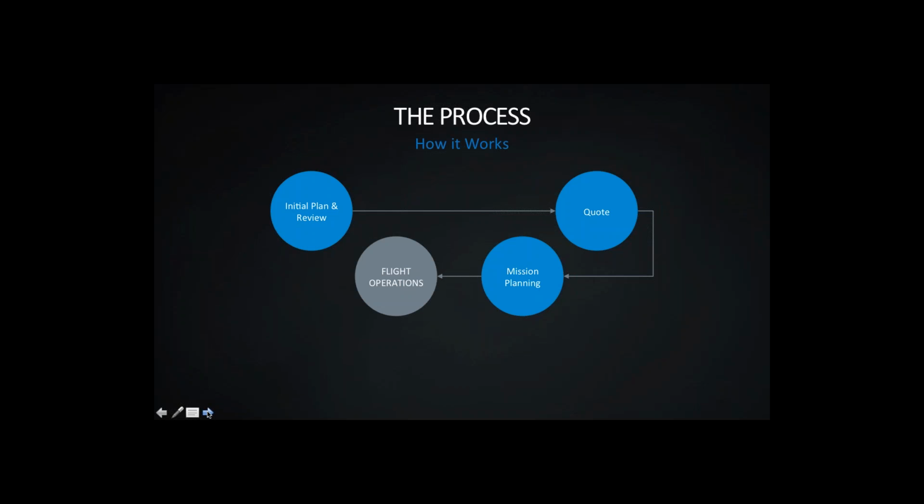The flight operations component of the process might be the quickest and shortest component of everything. Sometimes it's 2 or 4 hours on a site, which is very common for whether it's a 1-acre site or a 200-acre site. Usually it's a half a day. A full day is unusual for the same site. So the operations component is pretty quick, and the pilot and visual observer are necessary for the operations. Oftentimes, the visual observer is deflecting questions and entertaining the various parties that are there, including the dogs running loose trying to attack the drone. So the observer actually is observing the unmanned system and helping take away the stress of whoever's operating the unmanned system, because it is energy intensive and draining.